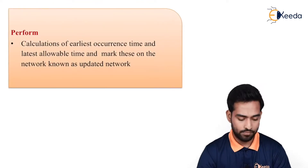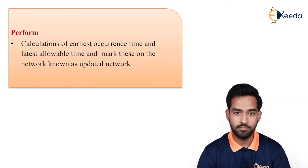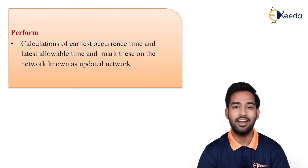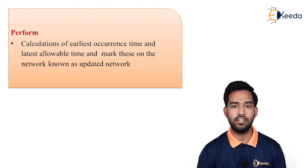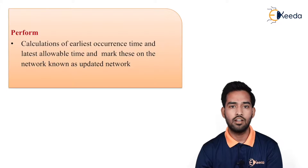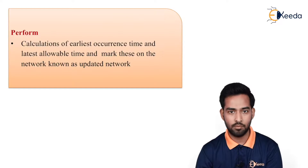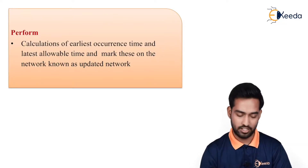Then 'perform': actual performing means calculation of the earliest occurrence time — that is, ESD — and the latest occurrence time, LSD. Mark these on the network, which is known as the updated network. After giving completed activities zero duration, ongoing activities their estimated time, and remaining activities their durations, we have to calculate new ESD and LSD for each activity.